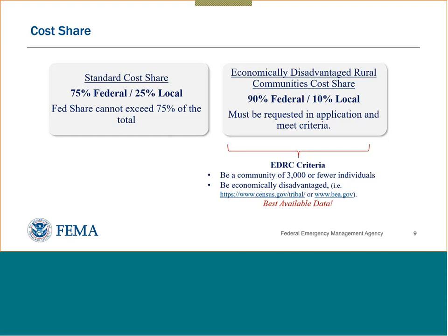So if your community meets the EDRC cost share, it's important to request it in the application at the time that you submit. After you submit, the cost share cannot be amended and reduced to the EDRC cost share, so it's important to request that in your initial application and provide your documentation there.